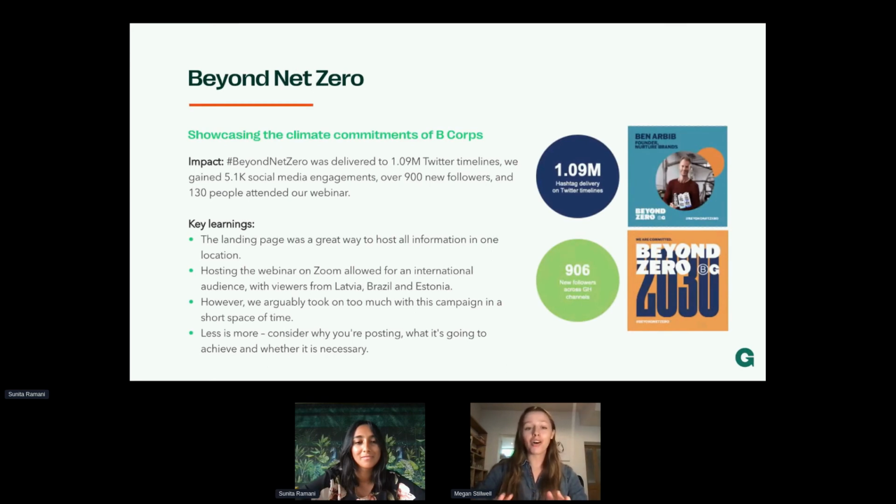However, we arguably took on too much with this campaign. We hosted interviews, we wrote blogs, we developed a creative identity, we developed a landing page and coordinated a webinar. And that was a lot of work in a single month, if not too much. So one of our key takeaways would be to give ourselves a longer lead time or just to do less, because we created so much content that we wanted to share, but then we felt that perhaps we'd flooded our social media channels.